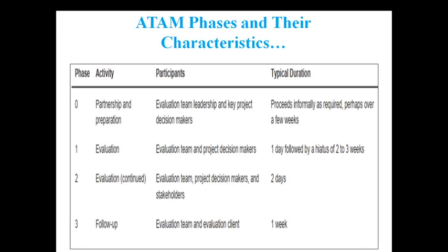Finally I want to show one table format: the importance of these participants, their work environment, and the duration they will take. See this, first one, partnership and preparation. Who are the participants here? Evaluation team leadership and key project decision makers will participate in this. They will proceed for a few weeks. Next, phase 1: the evaluation team members and project decision makers will sit for 1 or 2 days to verify all the things.